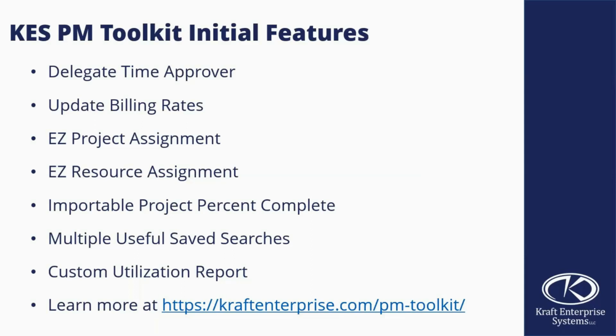Very tedious. We've got a way to import those percent complete. So now you can quickly run a search to export all your active projects, update your percent complete for the month, and import it in for those that are using that RevRec.